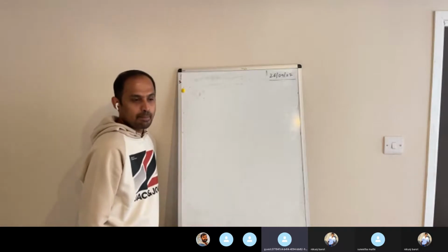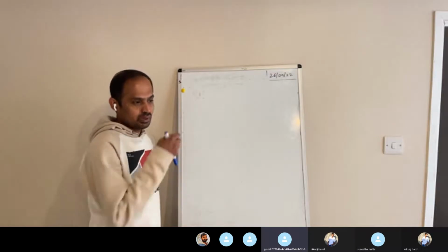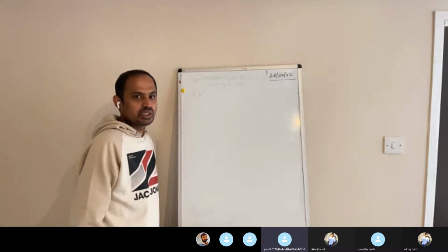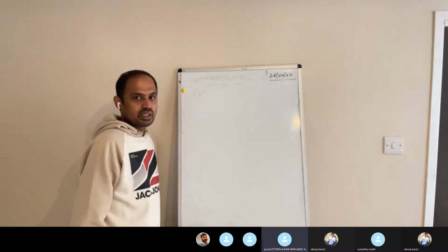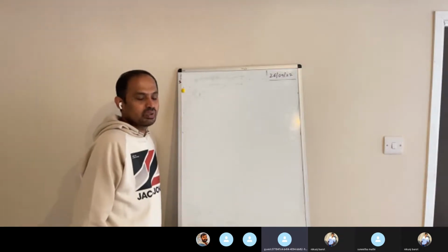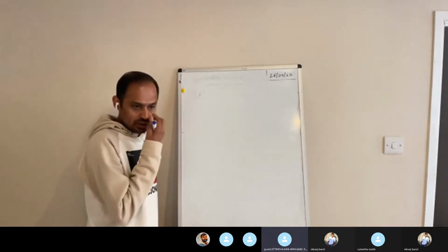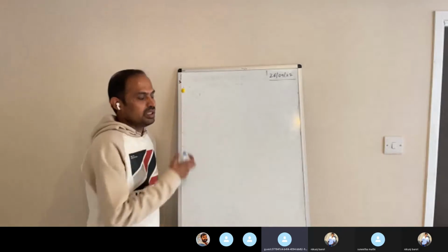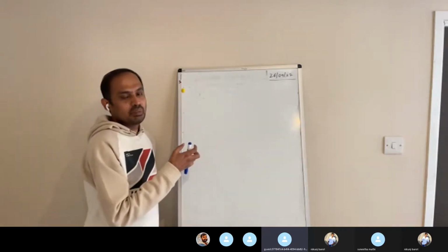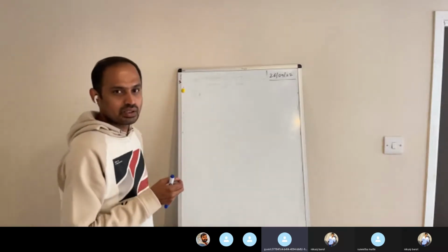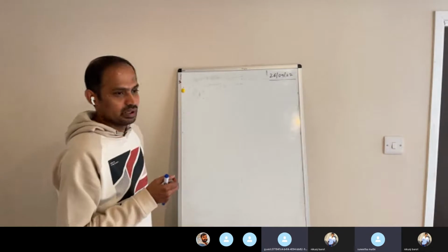Fifth one is assumptions. Here we are going to take an assumption that we require only 3 testers for this project, and 3 testers is enough to test this whole project. That is an assumption. And if we want to do automation, we are going to select the Selenium tool and Java as the technology. So that is also an assumption that this automation will be covered with Selenium. Technology and tools are also assumptions.